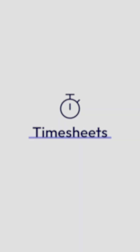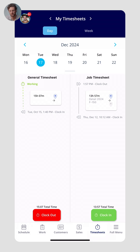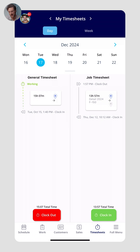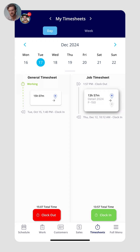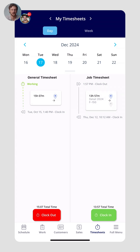Next, let's talk about timesheets. There are two types: general timesheet tracking — I'm clocked in here and have 15 total hours — and job timesheets. General is like clocking in at eight and out at five, paid for the whole day. A job-specific timesheet tracks time spent on a specific job, which helps you figure out the correct profit margin for every single body of work.